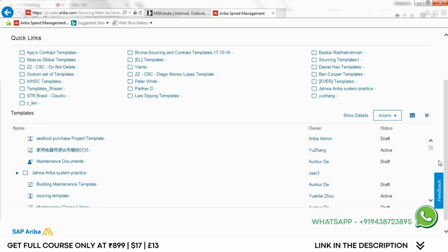If you want to go with commercial terms, then we'll go with RFP, request for proposal, where all the suppliers give commercial terms, but not competitively. But in an auction, they'll be competing with each other in the same room, online or offline, on the same platform.